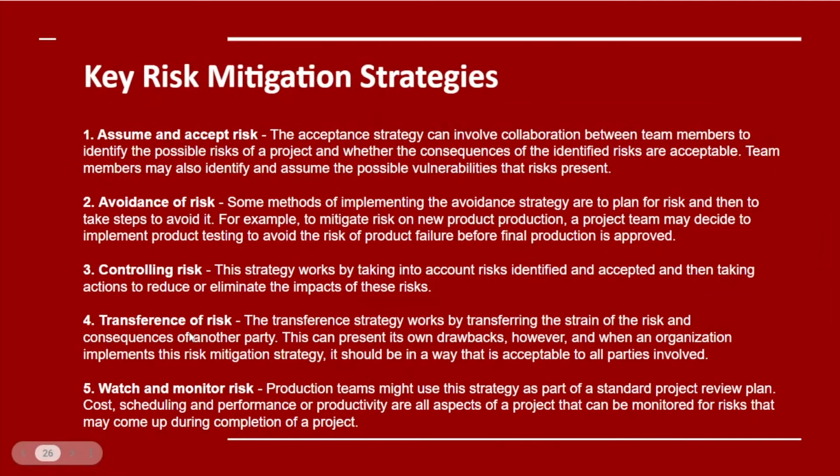Transferring the risk, we do that all the time. Every year, White Hills spends $50,000 on insurance. That's transferring the risk. So what you're doing is saying, okay, insurance company, if you cover me, I'll pay $50,000, if you take over all of the worry that I have about risk. And watch them under risk. This is something companies need to do on a constant basis.